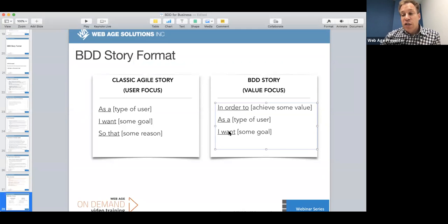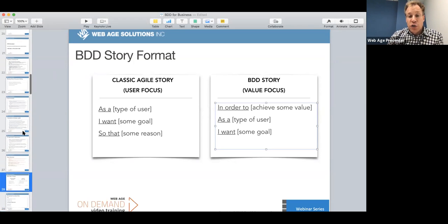Now, the reason we don't see this currently, and this sometimes may not become an issue, is because a lot of teams have a tendency to not describe the behavior that they're looking for. That part of the story kind of trails off. It'll say, I want to be able to withdraw as an ATM user. I want to be able to take money out, but they don't say why, or they don't say the behavior that they're looking for. So then the team blindly builds functionality. And when we turn it over to the product owner for testing or approval, they say, well, that doesn't do what we want it to do. It's because the product owner sometimes didn't tell us the behavior that they actually wanted the functionality to achieve. So we're switching things up a little bit here to describe behaviors first and then functionality.